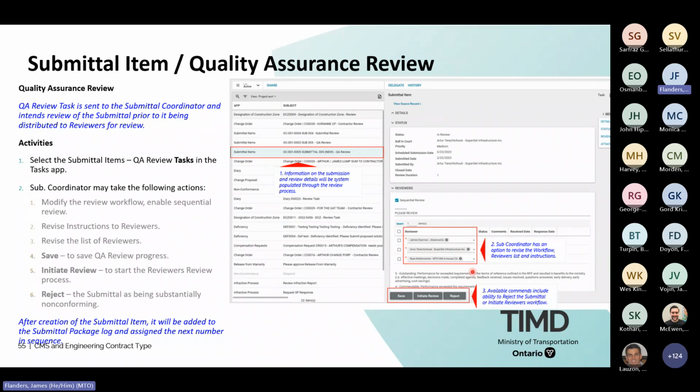Okay, did we get the right items? Because they can even bother their functional office reviewers. So basically, once they're happy with it, they're able to see who their reviewers are, and then they can initiate review. Once the reviewers have reviewed, the options for the submittal coordinator will become things like review. So the responses to the service provider are reviewed as noted, meaning that there's notes and or revisions potentially required, or rejected. And rejected requires a new submission.